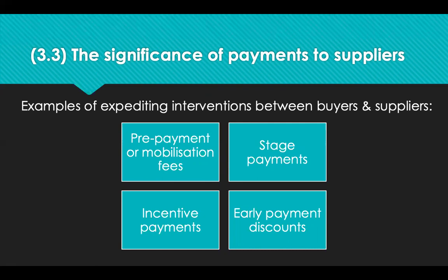Early payment discounts is cash offered as discount to the supplier to encourage the buyer to pay early. And some suppliers might enforce their right to extra payments for late settlement. And any deviations from planned payments into or out of the organisation need to be tracked, and remedial action may be taken to mitigate disruption or cash flow. So, for example, organisations can reduce the amount of stock they hold or negotiate extended credit terms with their suppliers.